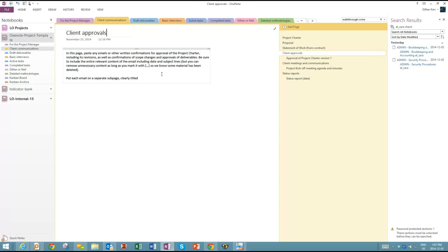What often happens is that during the project, the client and we might change our mind. So we say, well, we were going to do 2 surveys. We've agreed, we really need to do 3 surveys or only 1. When something is agreed that affects the contract, that affects the deliverables, we want to capture it so that there's no misunderstandings, that we have that written down.